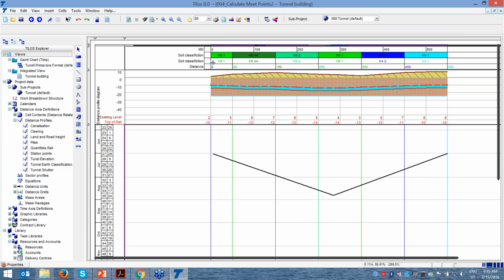Anyway, I have one team here, one team here. So what is my goal? I would like to find the estimated midpoint. It means that this is 550 meters and approximately 275 meters. It means that here is the estimated meeting point. But this is the best case when there is no soil type considered, because here and here we have different soil types. Because of this, our speed can change.